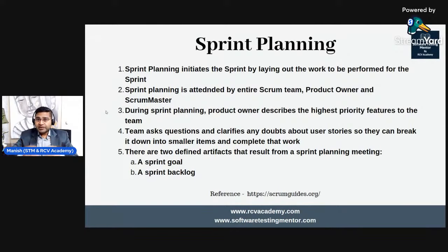So the sprint planning meeting initiates the sprint by laying out the work that needs to be performed within those 2 to 4 weeks. The standard is 2 weeks; most organizations use 2 weeks. 4 weeks I have rarely seen. 3 weeks, yes, some organizations also follow. 1 week is highly unlikely. It's only possible when there is only prototyping work that needs to be done.